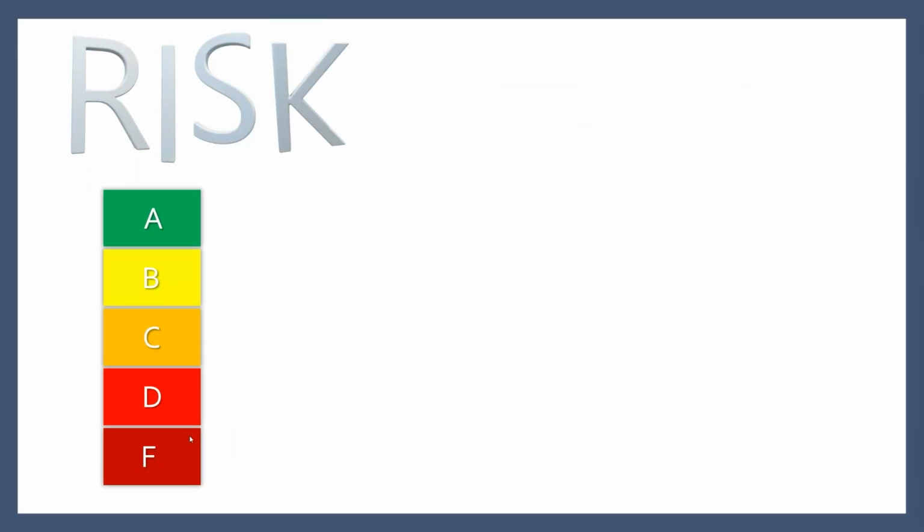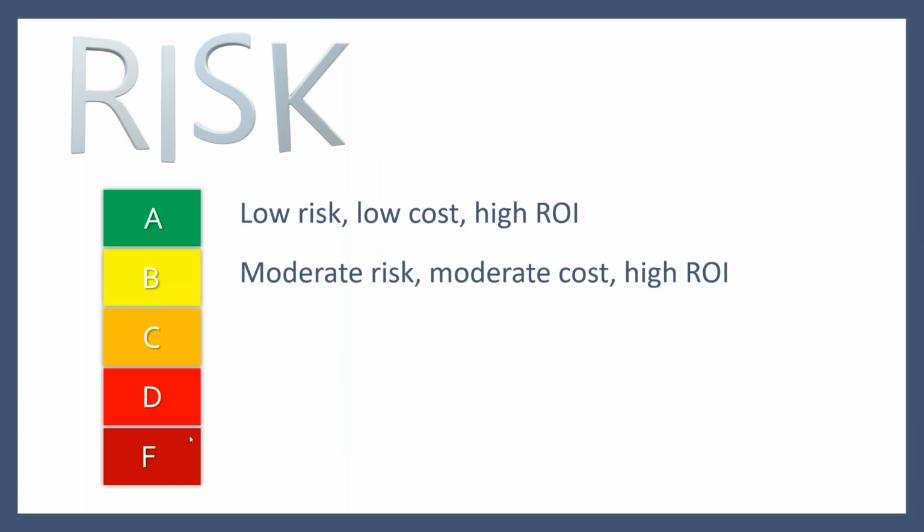Go back to risk. What is the risk if we have a good roadway and we don't do anything? There's not a lot of risk. It's in good shape, and it's probably going to be in good shape next year. If I do something, it's going to be low cost, but the return on investment is going to be pretty high if I can keep that roadway in the green, as I call it. We're keeping a high condition level that's pushing that deterioration curve way out in time. That's what I want to do. It's not a lot of risk and not a lot of cost, but pushing that time frame further out in front of us is helpful, and it improves the return on investment.